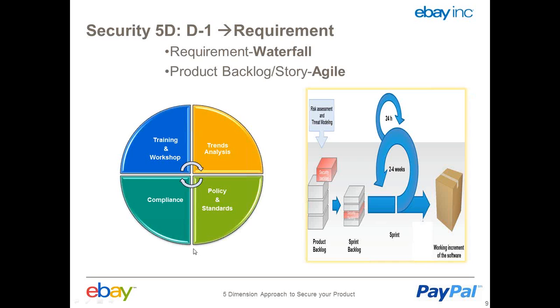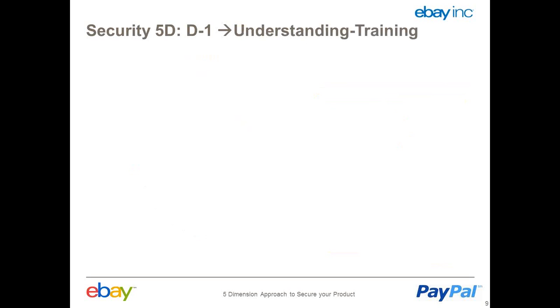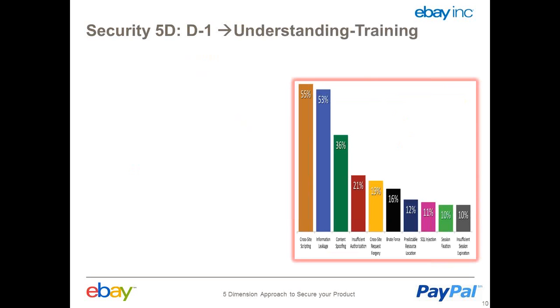Once you put that in place, it will definitely become part of the sprint backlog, and then we should be able to follow any of these dimensions very easily. The very important key takeaway is: when you are in Agile and thinking about security, and my data clearly showed security is important, always ensure that you have a security backlog in your product backlog so that you can drive to solutions.